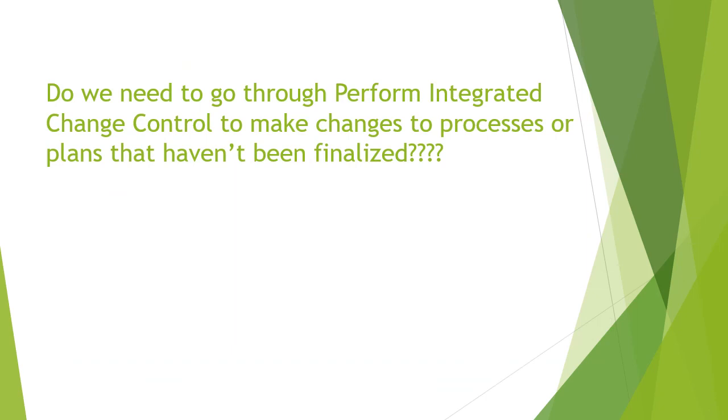So do we need to go through perform integrated change control to make changes to processes or plans that haven't been finalized? No, right? See, it is very important from the exam point of view. When you are preparing the project charter or working on the project management plan, changes can be made without a formal change request.